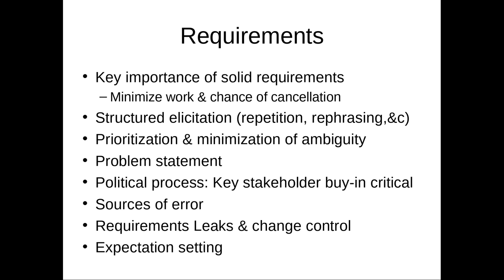So many times what seemed to us vernacular, informal terms turn out to actually be really structured meaning. This is a political process, like being clear who you're asking from, which stakeholders giving the requirements is often critical. And often you begin with a problem statement, like what's the gap between what is now and what could be? You use that to guide an understanding of where this project is coming from. Sources of error: failure to recall, failure to understand multiple terms, hearing different things from different stakeholders, failing to capture it as it was being said. These are some sources of errors.